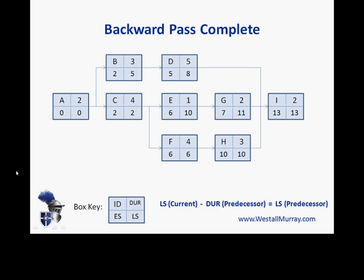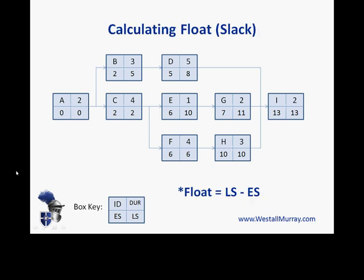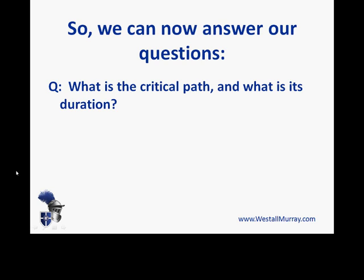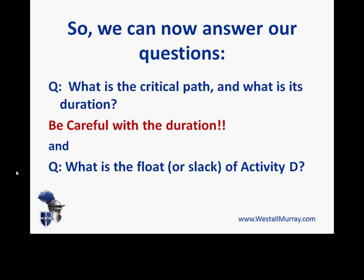The backward pass is complete, which means we can now calculate float or slack. The formula is: float equals late start minus early start. Subtracting through, for D the late start is 8 minus early start 5, equals 3. Note that some tasks have 0 float — those are the critical path tasks. Having a float of 0 means that the task is on the critical path. So we can answer our question: what is the critical path and what is its duration? Be careful with the duration.